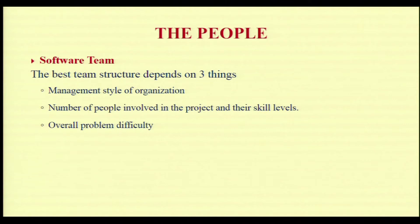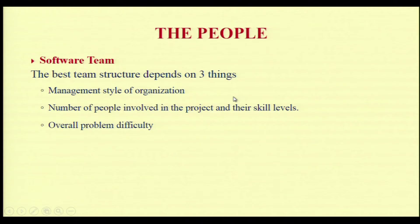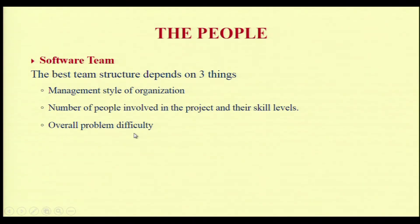The best software team structure depends on three things: the management style of the organization — whether top-down, bottom-up, people-centric, or sandwich type; the number of people involved and their skill levels; and the overall problem difficulty. Skill sets of appropriate people are very much essential in software development, and the level of difficulty practitioners encounter must be assessed properly.